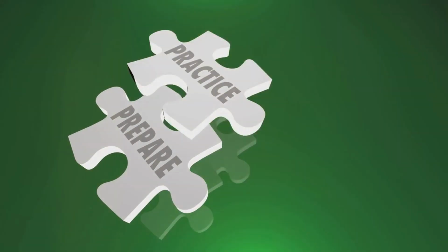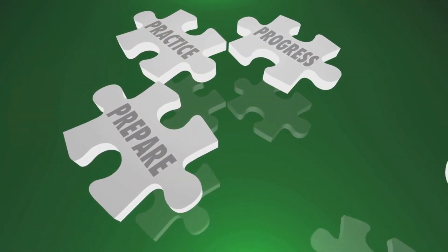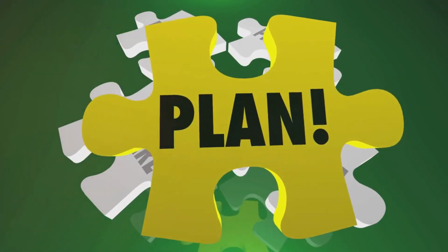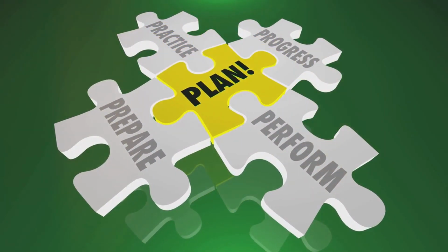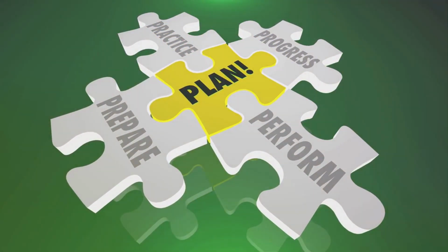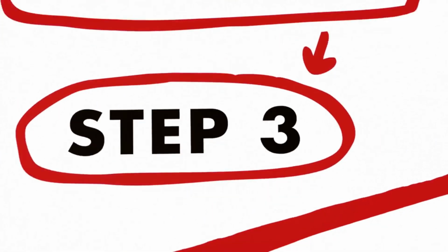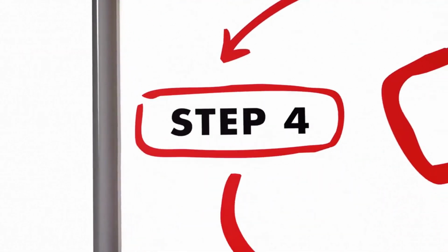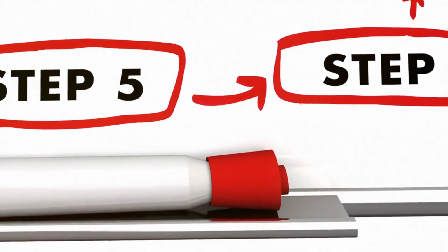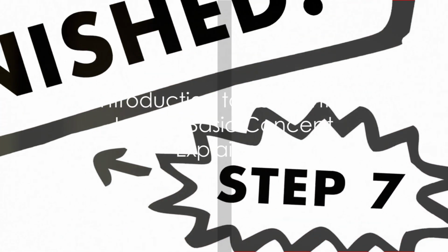In the world of sequential logic, we also talk about predecessor and successor activities. A predecessor activity is any activity that must be completed before a given activity can start, while a successor activity is any activity that cannot start until a given activity has been completed. But remember, these terms are relative to the activity of interest, meaning an activity can be both a predecessor and successor, depending on the context. That's the basic concept of sequential logic.